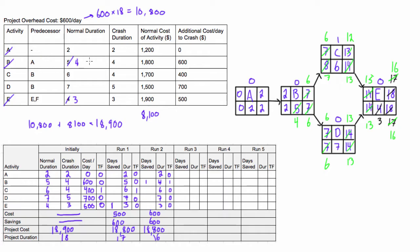We can't crash activity B anymore because the shortest we can make it is four days. So now this leaves us with two alternatives now. We're only able to crash activity C or D. But we're just gonna crash this as much as possible and then evaluate later what to do with it.